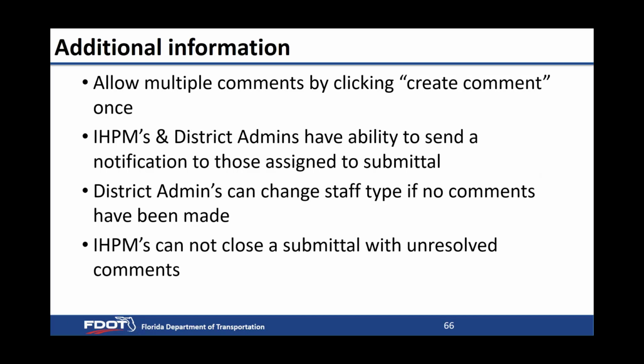In-house PMs cannot close a submittal with unresolved comments. And it's not only in-house PMs, it's also district admins. You can only close a submittal if all the comments have been resolved. Otherwise, it stays open. And we encourage folks to get these comments resolved and move on to the next phase and the next submittal, because the more submittals that are open, even though it may have gone past its review cycle, it affects the performance of the system.